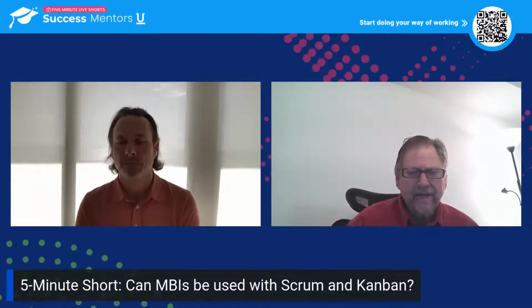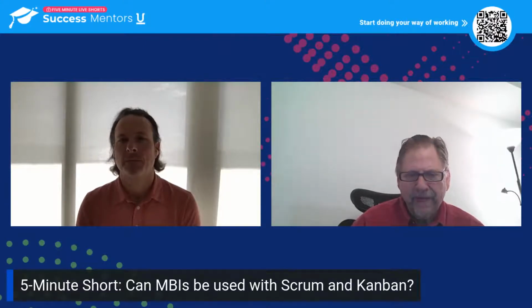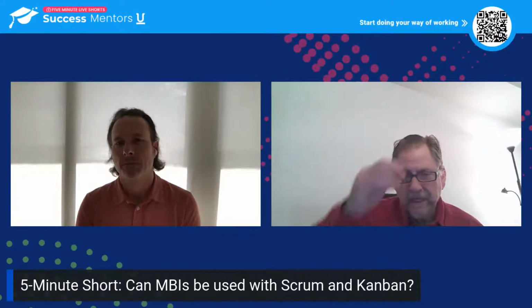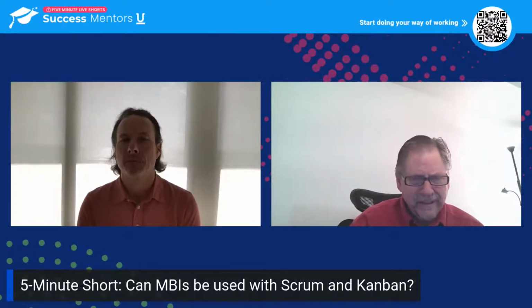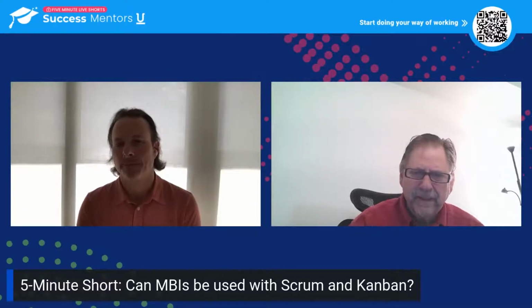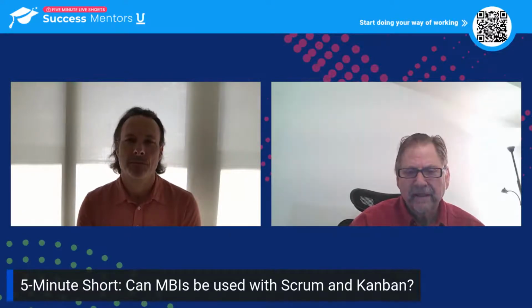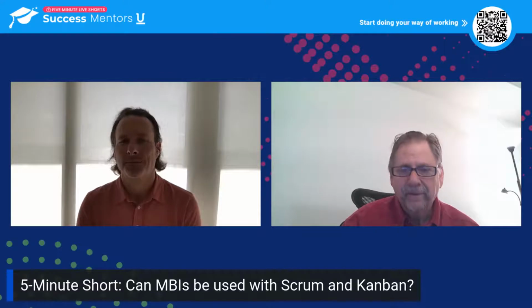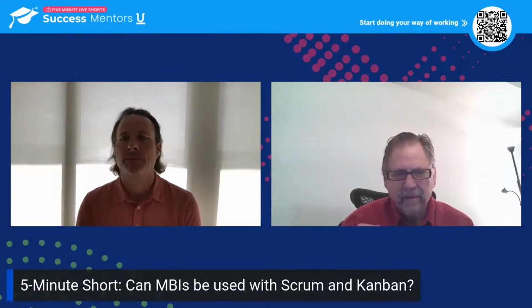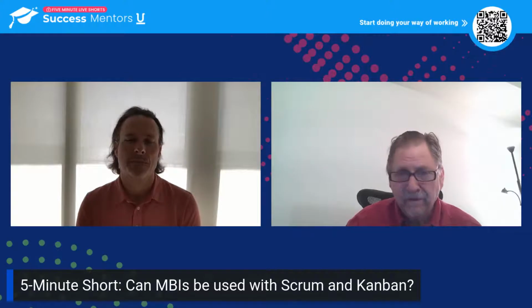Scrum and Kanban now mostly have to do this through an indirect method. In Scrum, you think of the sprint backlog, what we're going to do over the sprint, and many people put their stories and features together, and then say, I can release. Of course you can release in the middle of a sprint, but you should actually be planning for that release, because then you plan to get it as soon as possible. Very often I see that things would be releasable, but people haven't thought about it that way. They're working on the features and stories, and then say, we could release this, let's release it now, instead of asking what we can do that would be releasable in the middle of the sprint, and what we can do next. Plan for that flow, because then you focus on that.